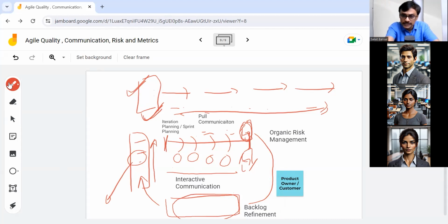Again, we are bringing people together to discuss future risks. So based on the risks which you see in your upcoming iterations, you may want to add some action items. For example, you can say this technology is risky, we want to learn this technology, so that item has to be added to the product backlog. Or, this technology is unstable, this dependency is unstable, I think I want to integrate this dependency fast. Yeah, so you want to prioritize that work early. So the whole impact of future risks is handled by way of adjusting the product backlog priority or by adding items to the product backlog.